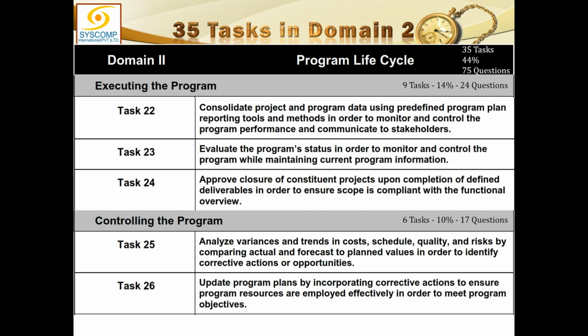Task 26, update the program plans by incorporating corrective actions to ensure program resources are employed effectively in order to meet program objectives. One thing I must clarify here, that the projects are being managed by the project managers, and within the projects, if there is any change request, that would be moved up to the program manager, and the program manager will be approving or rejecting those change requests.